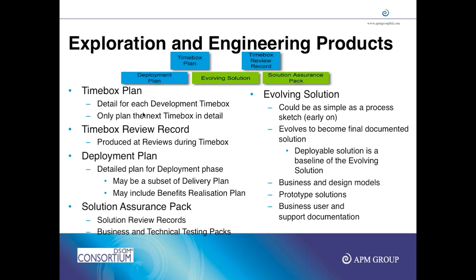Now, all of these could have some kind of a formal log you can keep. Like in our company, we have a log called the review log. And in the review log, as and when work is completed, we make an entry: code was reviewed by technical architect on date, and what were the comments. So that we know that people are following certain processes, which provides some kind of an assurance that the product will meet the required quality requirements.